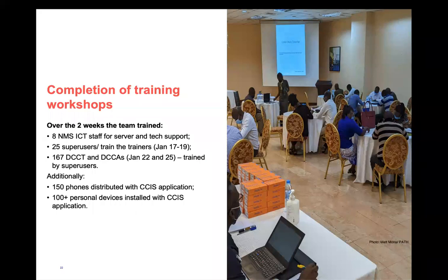So over the 2 weeks of the deployment, we trained the 8 National Medical Store technical staff who are responsible for the server and the maintenance of the technology side of the application. The 25 super users for training of trainers the week before, and then we trained the 167 technicians the week of January 22nd to 25th over 2.5 days. We distributed over 150 phones to the users with the app preloaded on it, and also loaded the application on about 100 personal devices, because it's an Android-based platform.